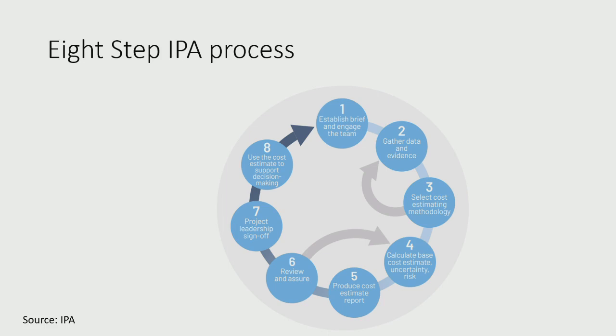Yes. So anything which, if it changes and the cost increases or decreases, then that's in principle a cost driver. So you can have cost drivers at different levels. Remember our levels of definition in a project. So you want to remember the project life cycle. So we can have a high level cost driver like the weight of something, or its capability, its specification, like say the capacity of a stadium, or the payload of an aircraft, the number of people it carries, or its range, for example. So you increase the range of an aircraft, you tend to increase its cost, increase its weight. If you can increase its complexity, that's another cost driver.